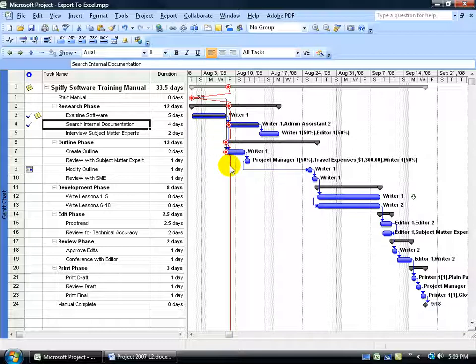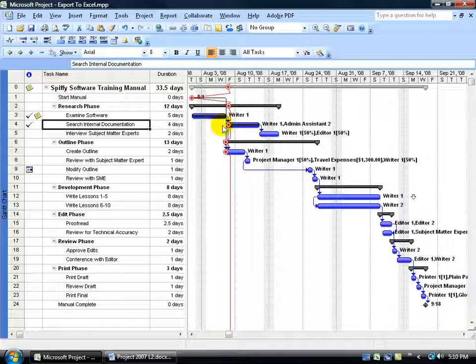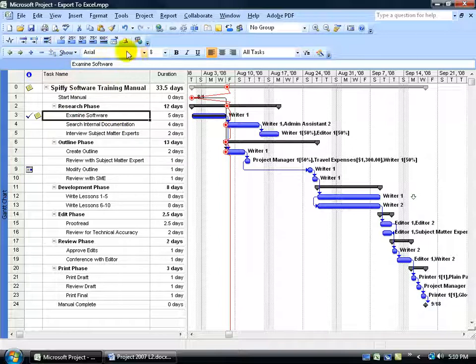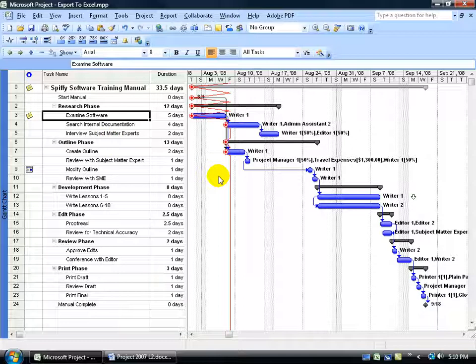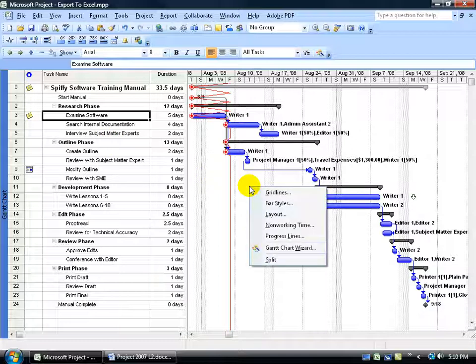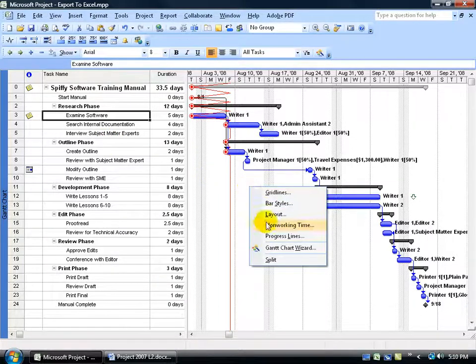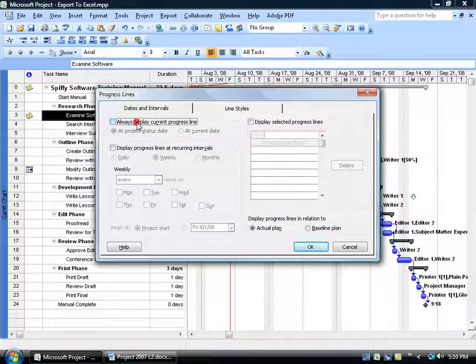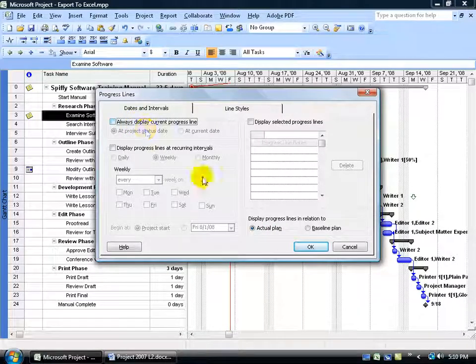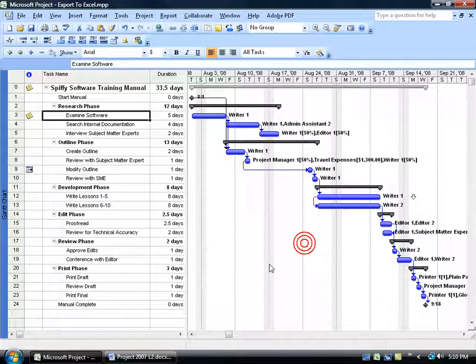And then to get rid of this, I've entered the progress for these tasks, but you'll learn that in the next training video. So I can go ahead and select the task and either hit 0% to undo all that, or hit the undo button. To get rid of the progress line, again, right click on the Gantt chart in a blank area, go to the progress lines, uncheck the box here, click OK, gets rid of it.